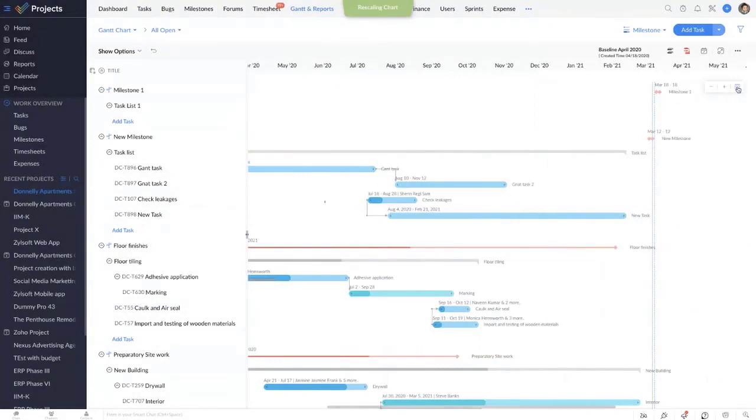On the left of the chart, you would see a list of activities, and along the top is a suitable timescale. Each activity is represented by a bar. The position and the length of the bar reflects the start date, the duration, and the end date of the activities. This allows you to view at a glance what the various activities are, when each activity begins and ends, how long each activity is scheduled to last, where activities overlap with other activities and by how much, and the start and the end dates of the whole project. Now let me resize this so that we could view it better.